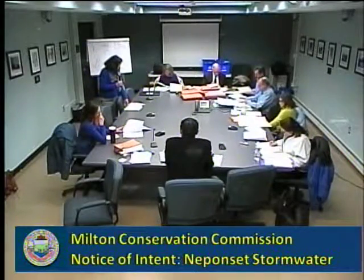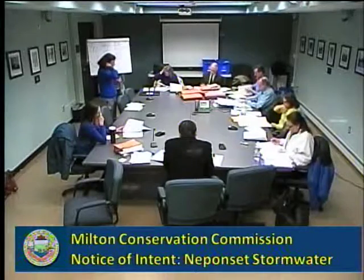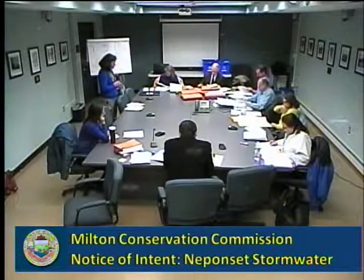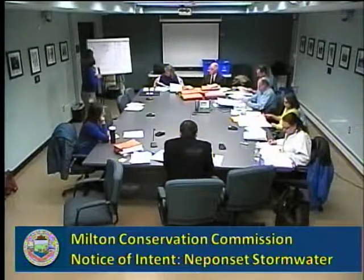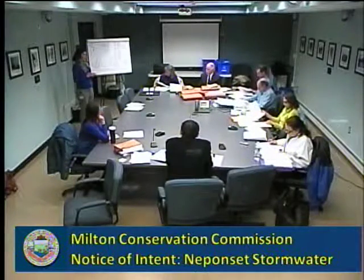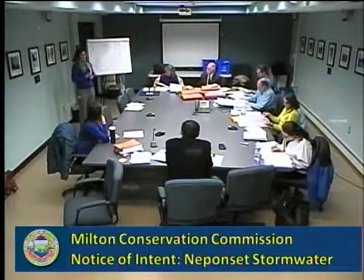In addition to that, at the meeting in February, there were some questions asked about the construction schedule. So in our letter, you'll see that there's a section with the heading construction schedule that outlines and explains what the construction schedule is. The BMPs that were shown on the overview figure are being bundled with some other best management practices in Weymouth and Braintree, and that whole package is scheduled to go out for bidding by Mass DOT in June.